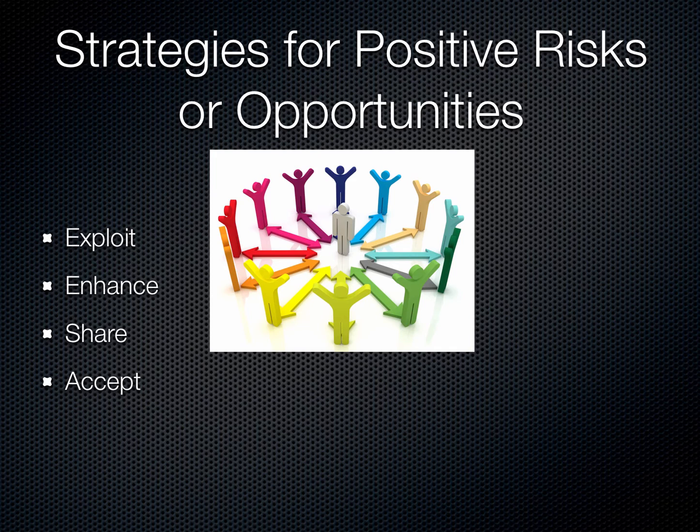Enhancing an opportunity involves increasing the probability of the opportunity happening, for example, maximizing better drivers to finish a job earlier, reducing costs, and therefore maximizing profit. Sharing the opportunity is to involve a third party to take advantage of it, and in turn, all parties benefit from it. Accepting an opportunity is to acknowledge it and undergo it if it arises, but not to pursue it.